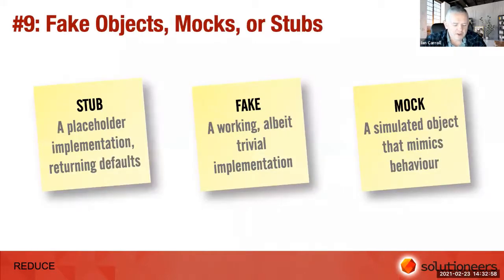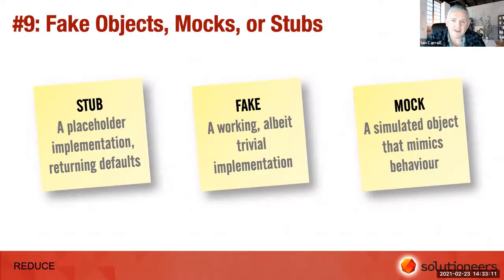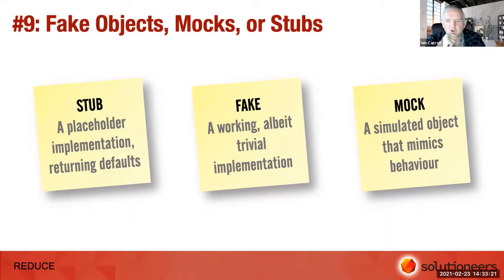Number nine: if you're going to hand off because you need a team to produce an API, you could always mock it out or stub it yourself to enable you to continue your feedback loops with stakeholders and keep building capabilities. Of course, there's a challenge — you still have to come back at some point, plug it into the real interface, and do all that testing effort. So it's something to think about.